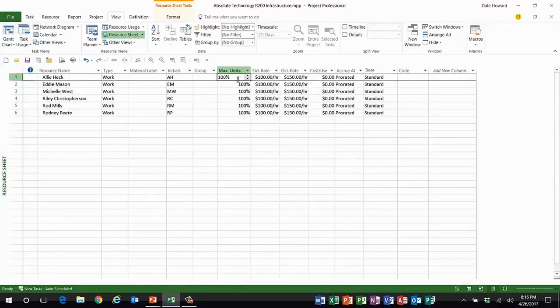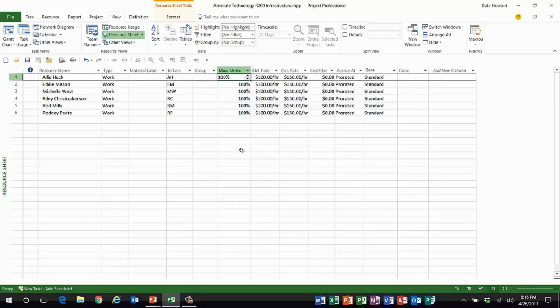So in the resource sheet view, her max units value is set to be 100%, meaning she can work up to full-time or 100% units on any task. I just found out the bad news right before we're ready to go live.